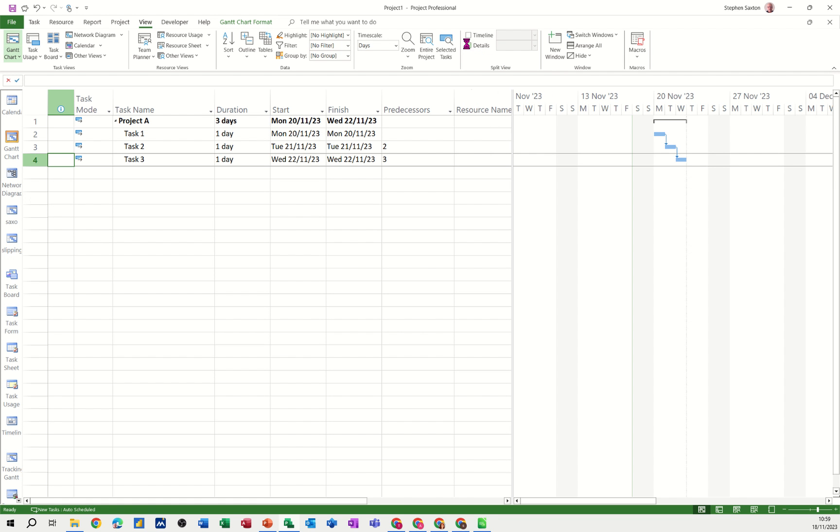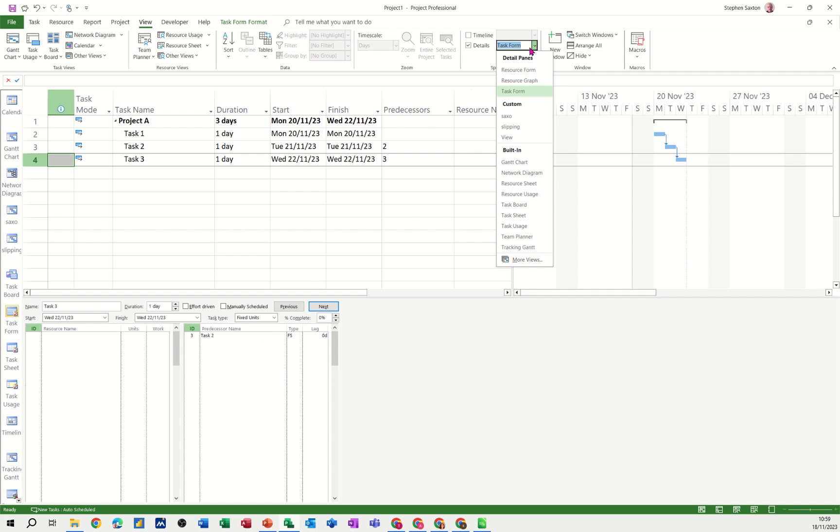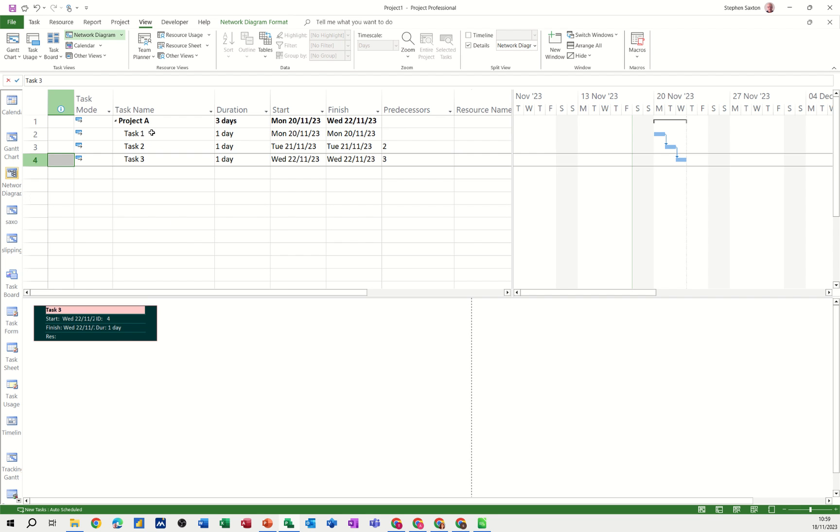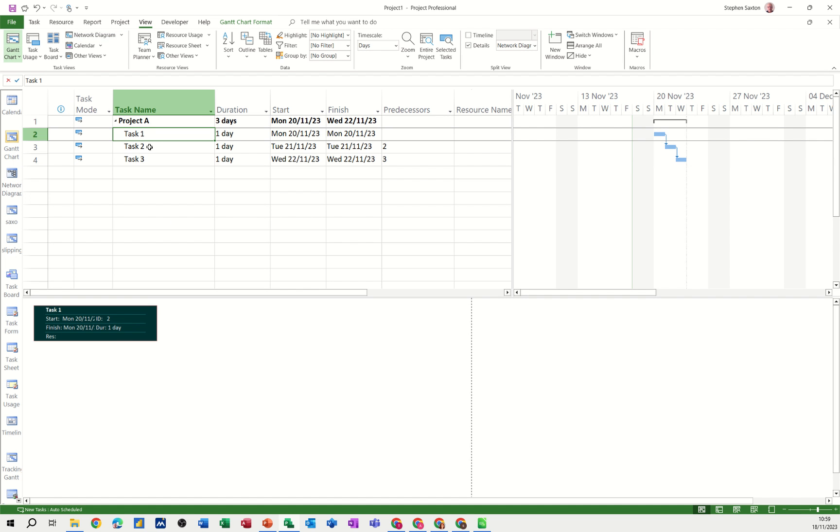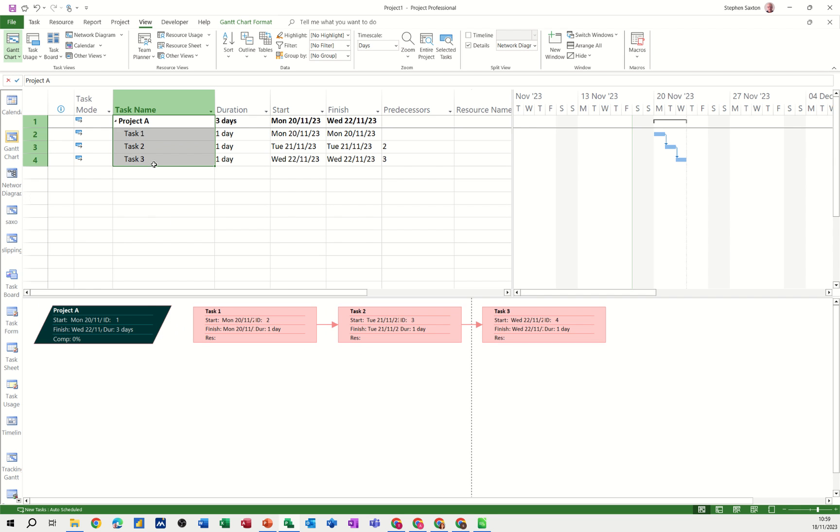Now when you tick details it will give you the task form but you can select options within there, one of them being the network diagram. At the moment it's just highlighting one item, one task. If I highlight all three it will give me all three. If I highlight the project it will give me the summary task as well. So this is the same project information but almost like a flowchart going through the project.